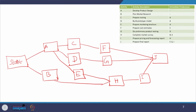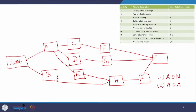There are different ways for drawing the network. One method is called activity on arc, where the activity is written on the arc. Here, the activity is written on the node — this is called activity on node, which many software packages follow. This is the network considering all the precedence constraints.